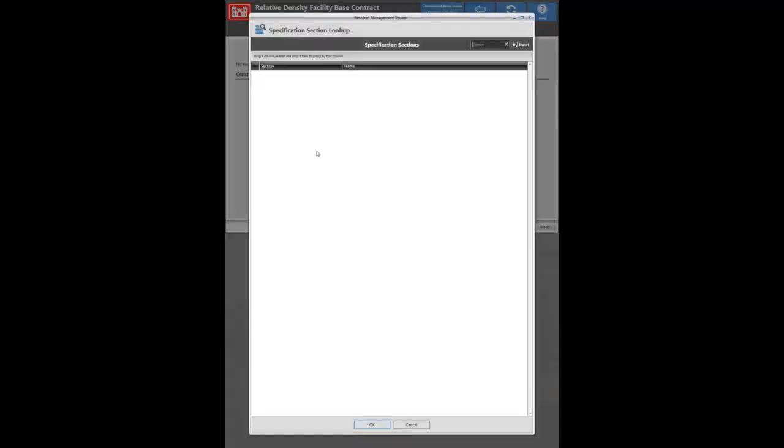You can alter the change request number by typing in a unique and valid change request number in the change request number field. The reason code will automatically be set to E, which stands for Excusable Delay for No Fault. You may also add a specific section to reference this change request by clicking Select a Specification. For this demonstration, we will leave this section blank, then click Finish.